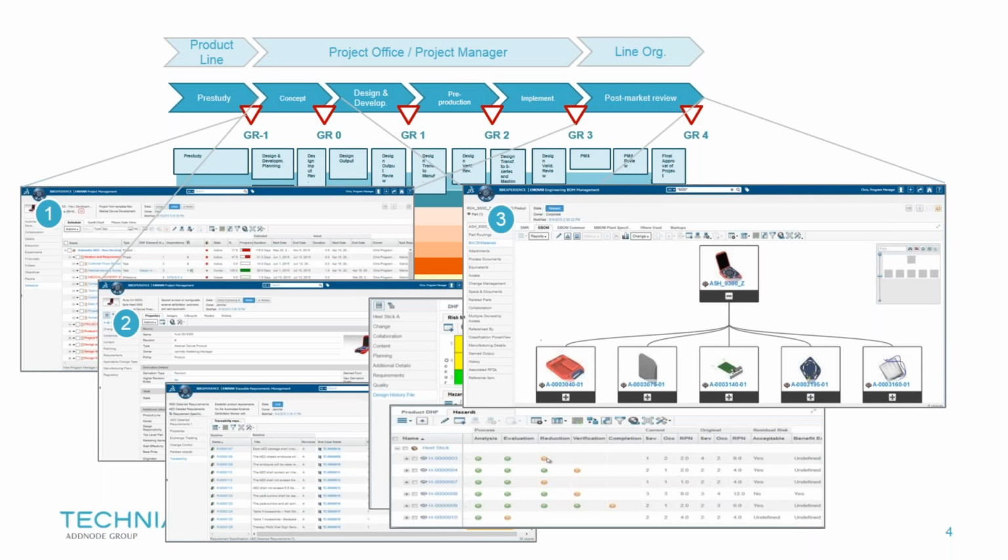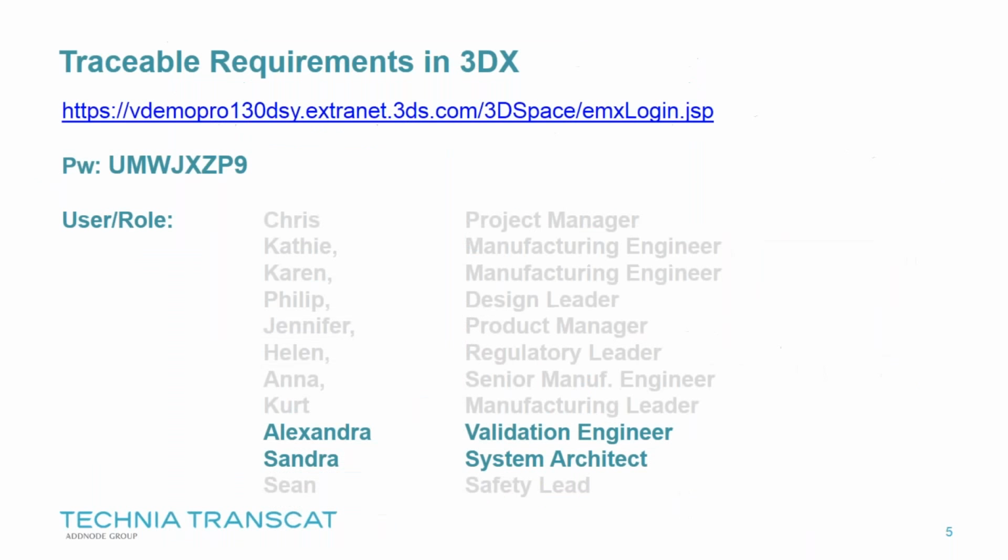So whenever we have a change, large or small, we can reconnect to the risk analysis, which was developed as part of the design controls, understand the previous root cause analysis, see that history, review the risk control measures, see if we need to detail the risks, have we had any confirmation on the risk control measures, and how do we take that forward. So it's a closed loop from initial requirements through to the risk resolution.